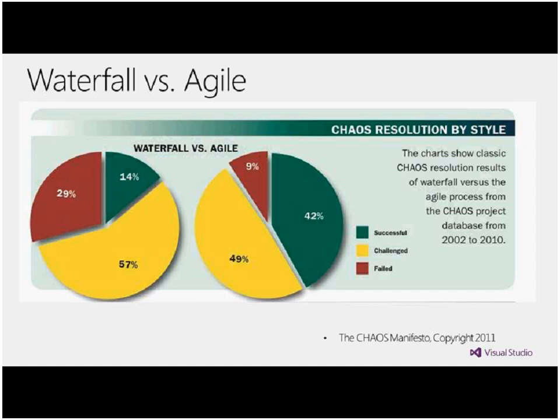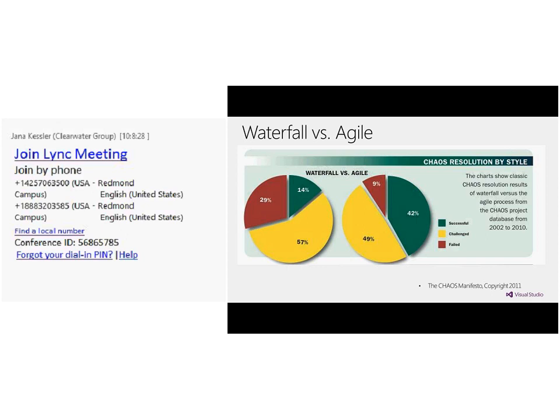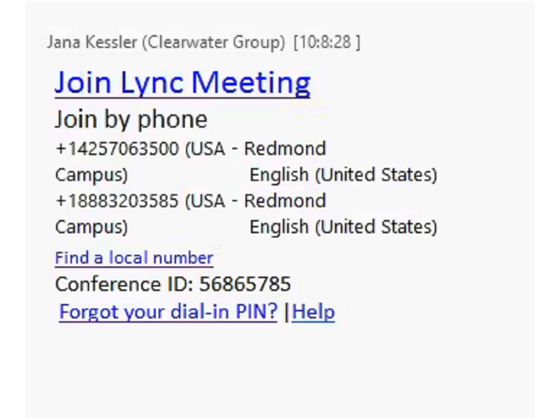But bottom line is that this big way of doing things, program management, if you will, is not Waterfall. It's what we call the governance tier, and it can be perceived as Waterfall. What we call Waterfall is really taking all the requirements first, then making all the design second, then doing all the development and then testing, delivery, with never coming back to the requirements. Today it has been understood that this can only be done in very, very specific situations, sometimes when you have very well-defined, reused requirements. So the applicability has become a lot smaller nowadays.